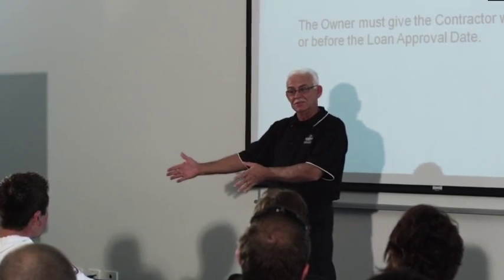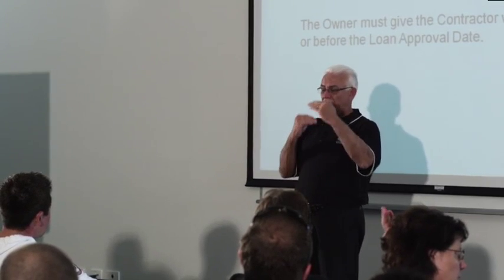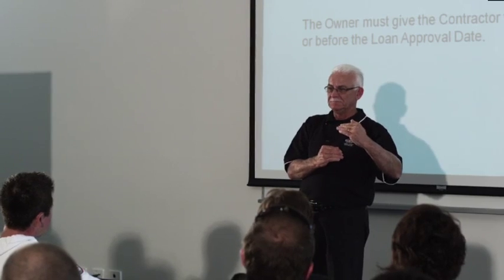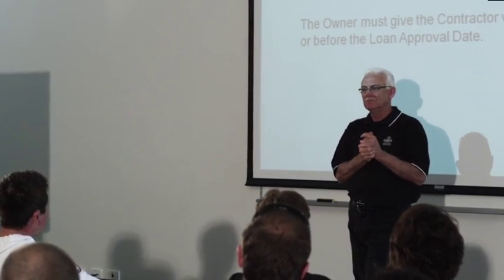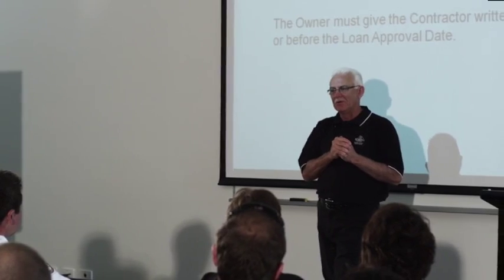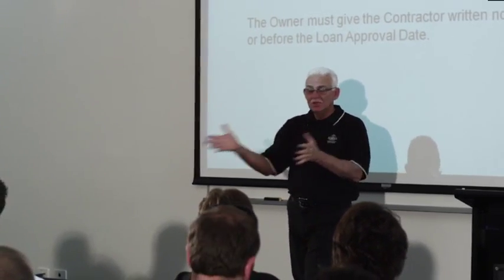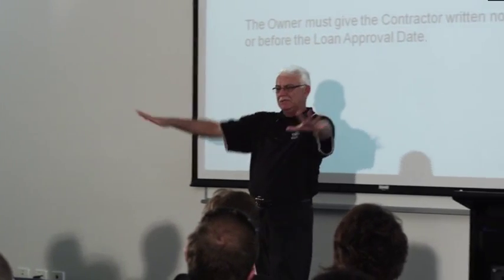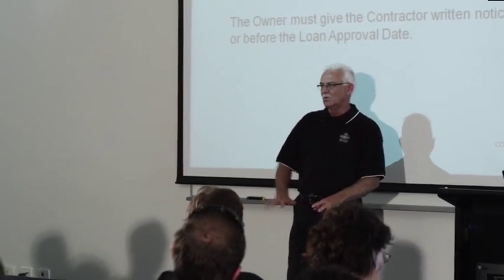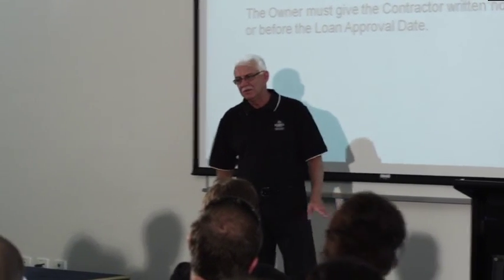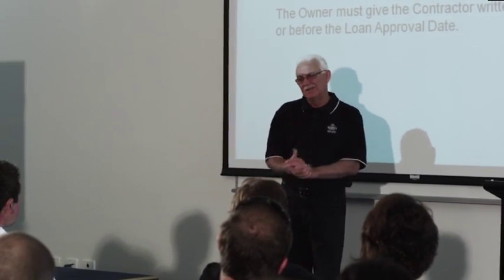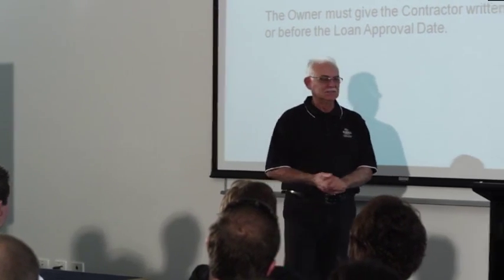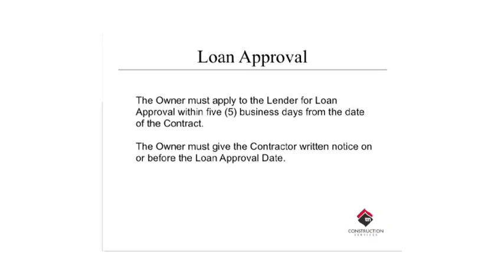So it's a variation, but you've got to specify what your allowance is for in the first place. So you'd have to specify the labour rate for that, if you're going to put in the labour only. If the owner came to you and said, look, I want big glossy tiles laid on a 45 with a diamond in the middle and all that, I'd be putting in labour and material. Yes, definitely.